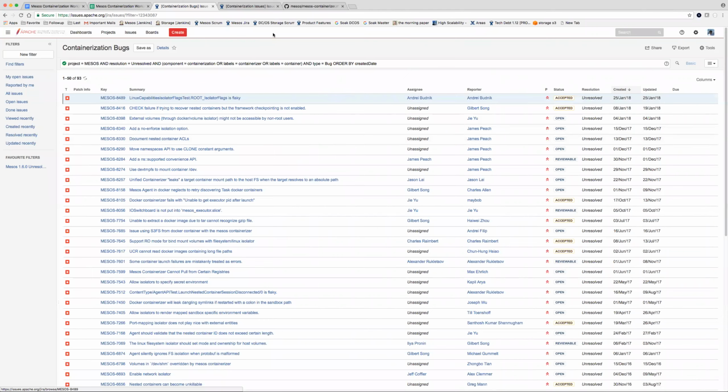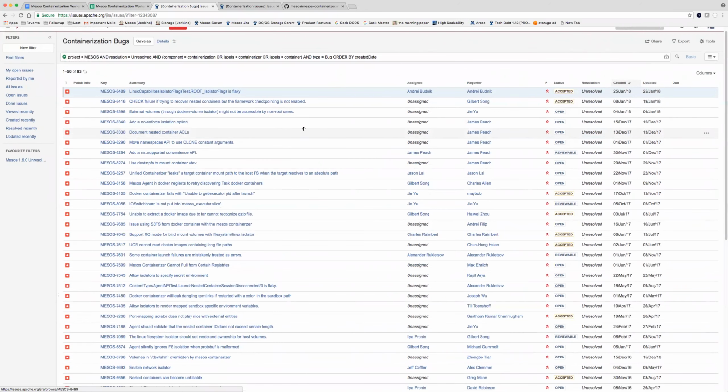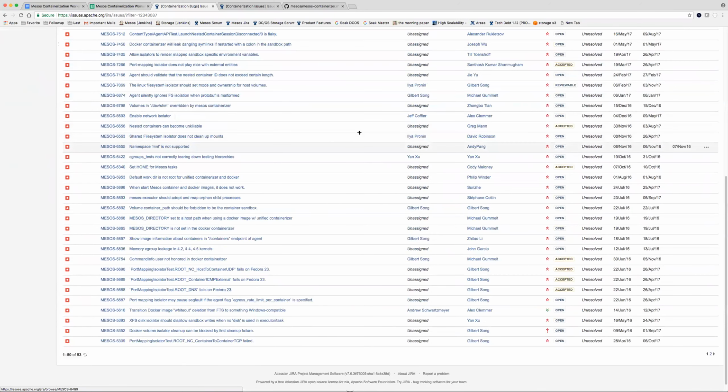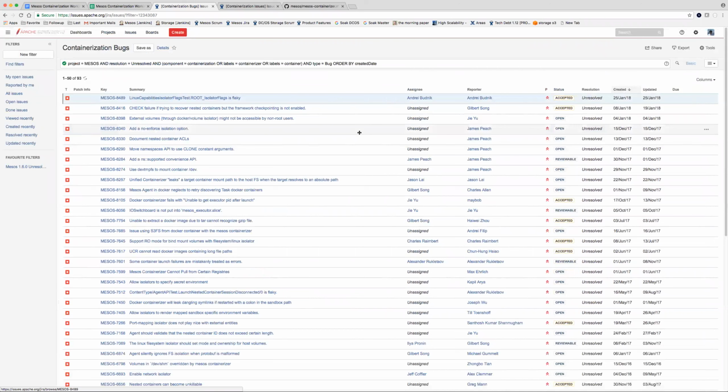I don't think we have enough time right now. I guess we can do that offline. I think it's too many tickets, like 93. There's no way we can cover them. Does that make sense? So JPG, can you do a grooming for all the tickets that I can send a filter to you? If you want to see a bug get fixed in the next release, please set a target version so we can track that.